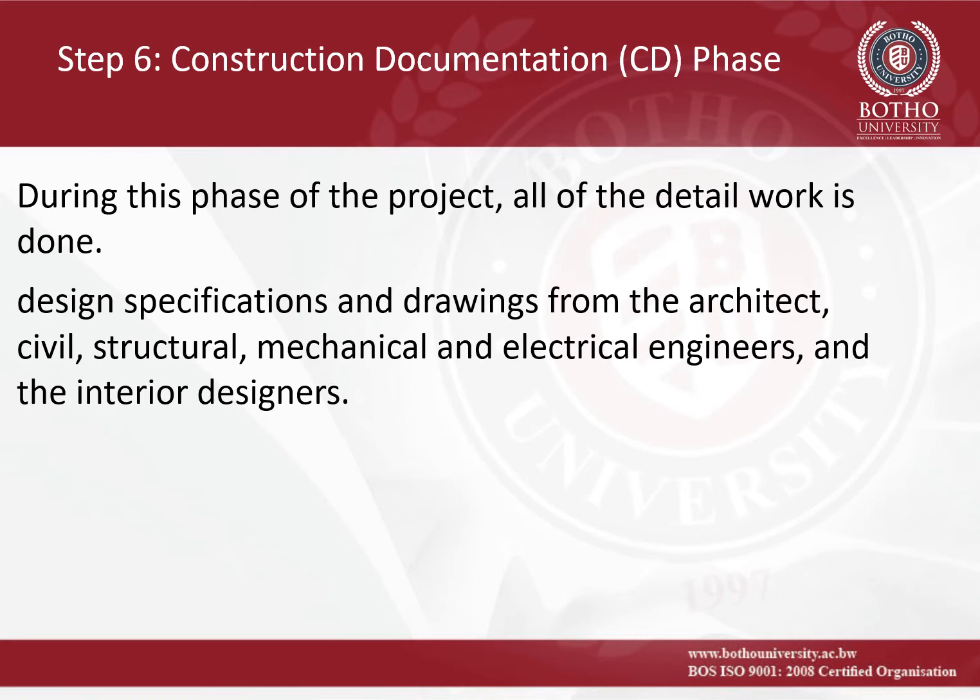The step 6 of the process is the construction documentation phase. During this phase of the project, all of the detail work is done that includes design specifications and drawings from the architect, civil, structural, mechanical and electrical engineers, and the interior designers.